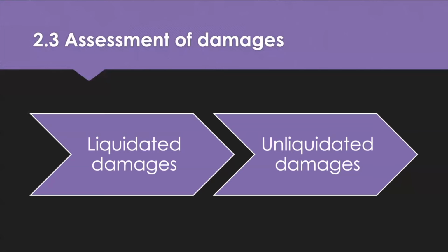But essentially, liquidated damages are pre-estimates of loss, and they're calculated by forming a genuine estimate for any cause of delay. So rent, fees, storage costs, loss of income are likely to be determined within liquidated damages.